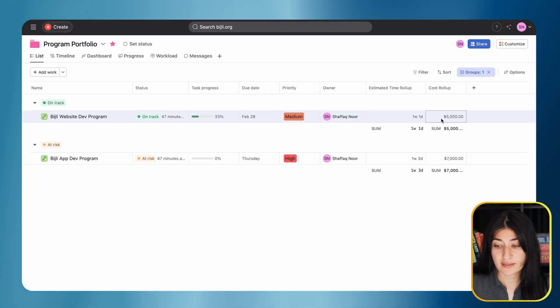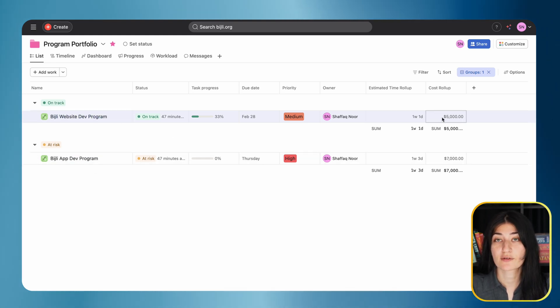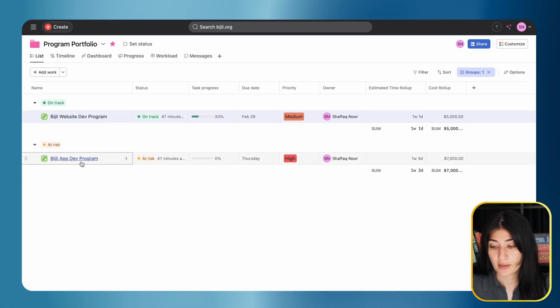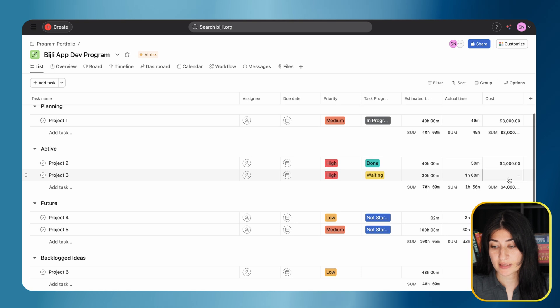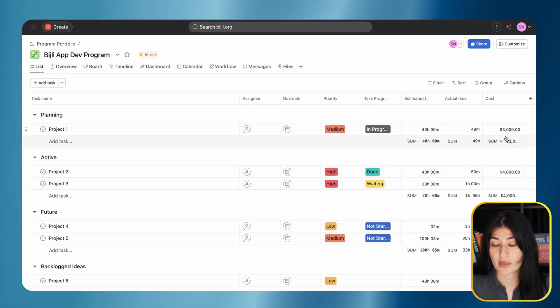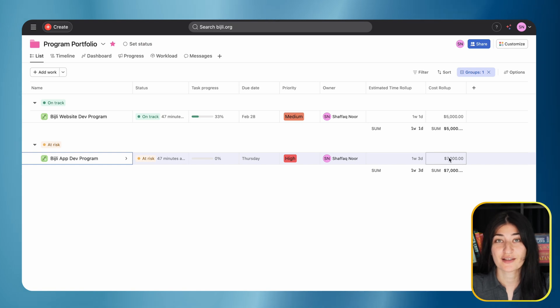There we go. Now I'll see that the cost for all of my projects within my programs are rolling up - $5,000 for the website development program. If I go into the app development program, I have $4,000 for one project and $3,000 for another, which rolls up to $7,000. So we know this is working.